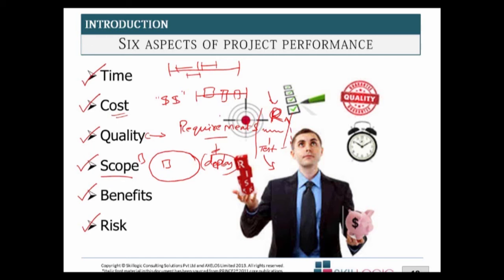If they say deployment is out of scope, anything related to deployment, we are not worried about. We don't even ask questions about that. If they say deployment is in scope, you have to deploy, run, and stabilize within the production environment, right? Then you're going to ask a lot of requirements related to deployment. So when a chunk of work is in scope, we go ahead and request more detailed requirements, so that we can deliver that chunk of work.